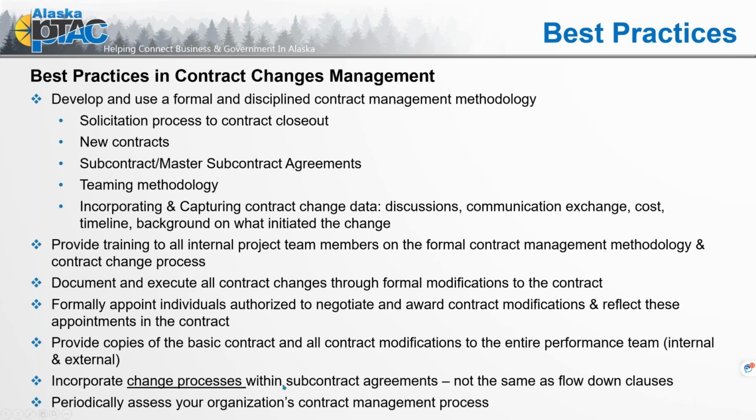Incorporate those change processes within subcontract agreements. It's not necessarily the same as the flow down clauses. So the FAR matrix actually has which clauses are mandatory for primes to flow down to subcontractors. Not all clauses are flowed down, but having a change process identified,